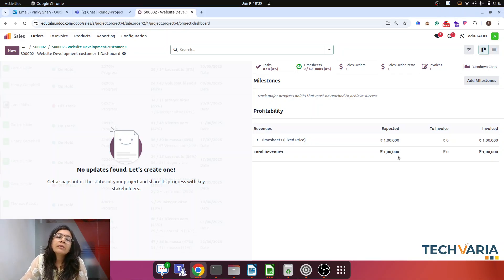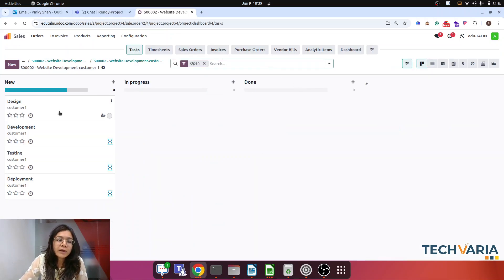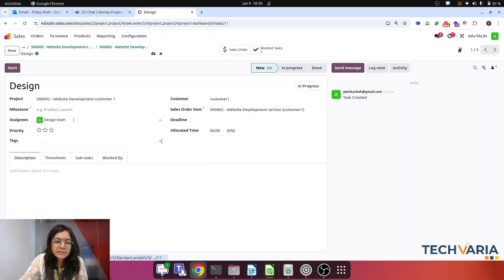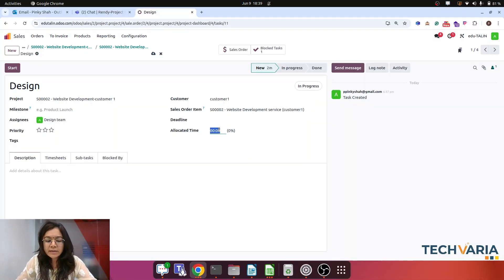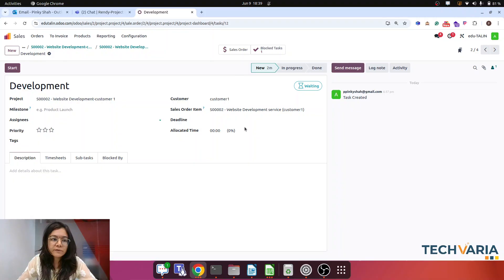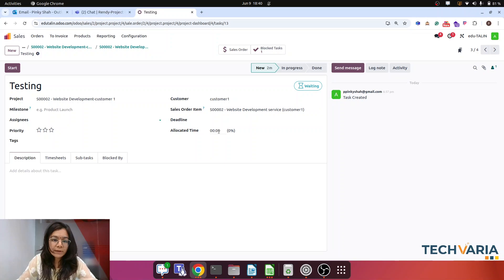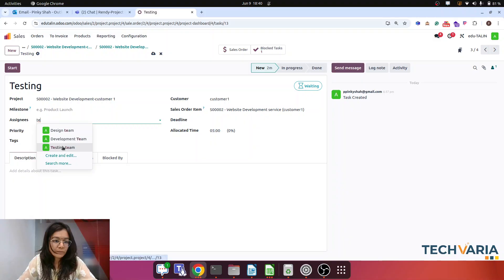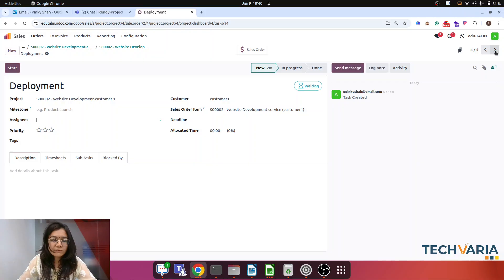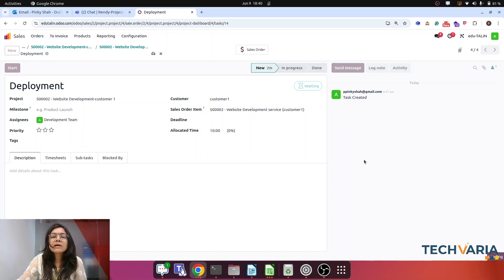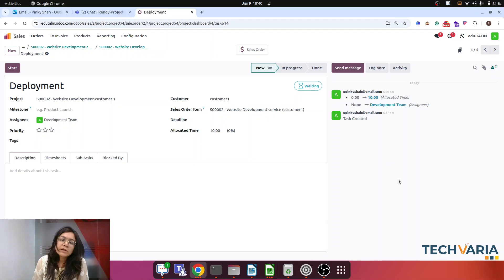Now we want to find what cost is behind this project. The four tasks are already predefined. I assign the design task to the design team for 5 hours, the development task to the development team for 15 hours, testing to the testing team for 5 hours, and deployment to the development team for 10 hours. These tasks are now assigned with estimated hours to the respective employees.